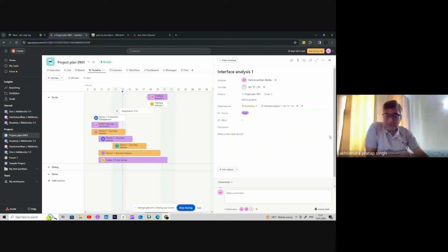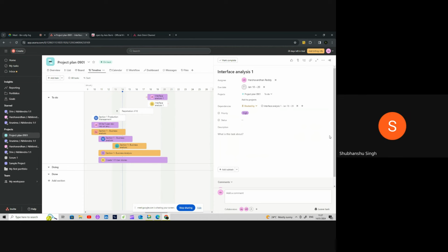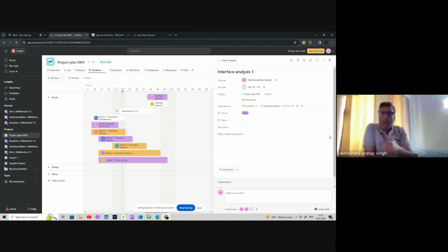So if the company is, let's say, taking 2 days to handle a process, and it takes them $1 million per month to handle that process, now when you deliver that project, the expectation is that these two KPIs will be affected. So your cost of operation should go down, and the time to process should go down. So your primary customer is the company which is funding that project.